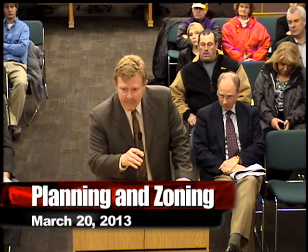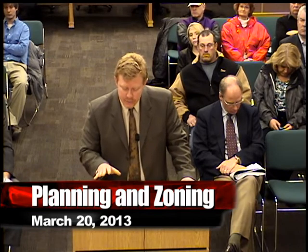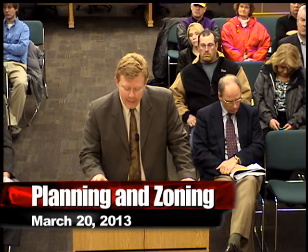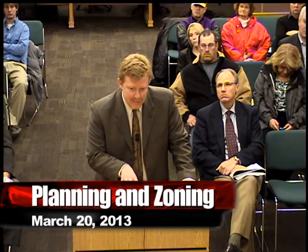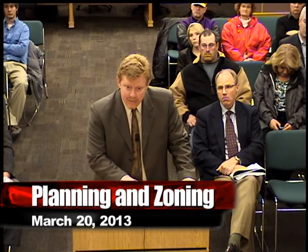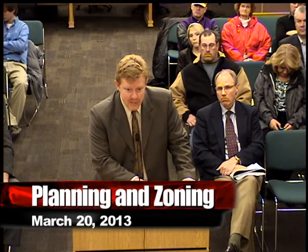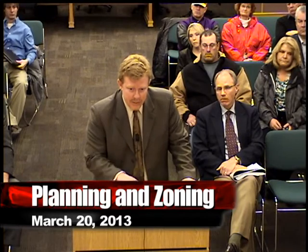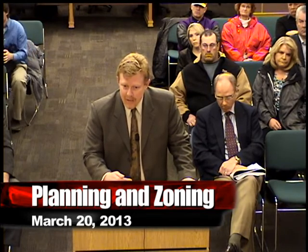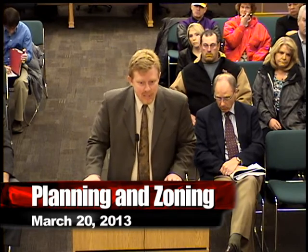Thank you, Chairman Abrahamson, Commission. You were talking earlier about some of the significant differences between a continuance and final platting. There is one thing I'd like to bring to your attention, and maybe even Community Director Corton can extrapolate further. If you approve a preliminary plat, we have allowed developers in the past to move forward with groundwork based on that preliminary plat at their own risk. It does allow them to start moving dirt and preparing foundations and such. So that's a significant difference between a continuance and a preliminary plat. I wanted you to be aware of that, because it has an impact on the practice we have had in the past. And maybe, again, Ed can extrapolate on that. I just wanted you to be aware of that practice.